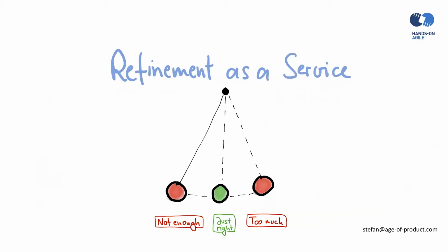It's, of course, helpful to have a definition of ready because it's setting a standard. It's not intended to be a checklist, by all means, but it is setting a standard and thus creating a mental model everyone applies unconsciously to creating good user stories or good issues, for example. There is the moment when you do too much refinement. I mean, you really don't have to break everything down to the last iota in advance. This is too much work.